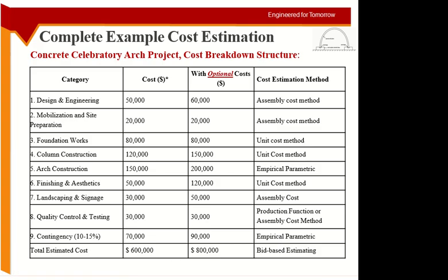In the past projects, my contingency, the money I spent extra because of unforeseen risks, was this much, and this was the size of the project. So I take contingency cost upon the size of the project. This will give me a unit rate for contingency, but it's not from this project, it's from the past projects.